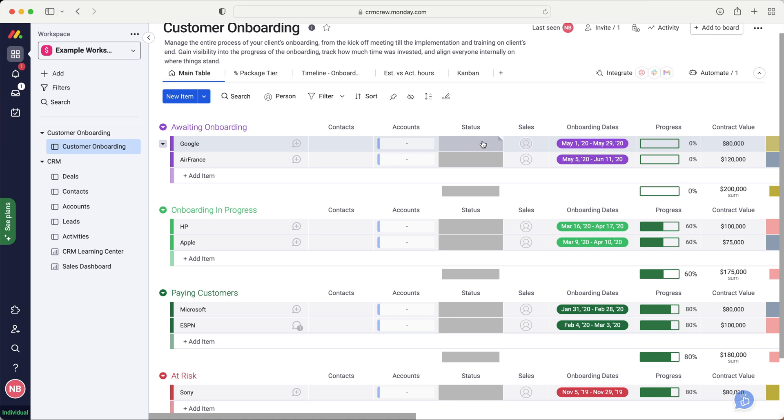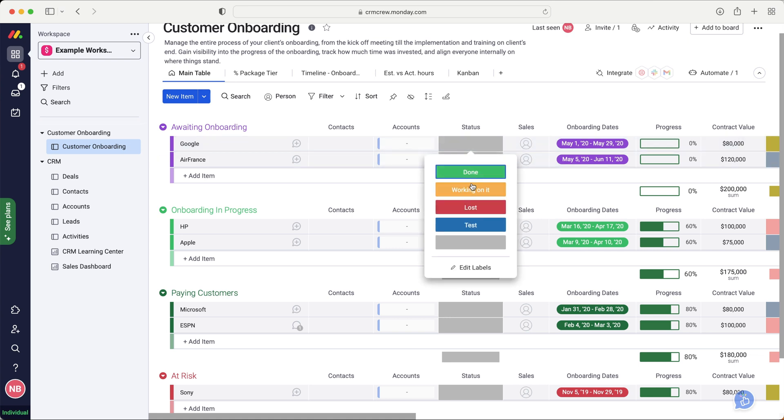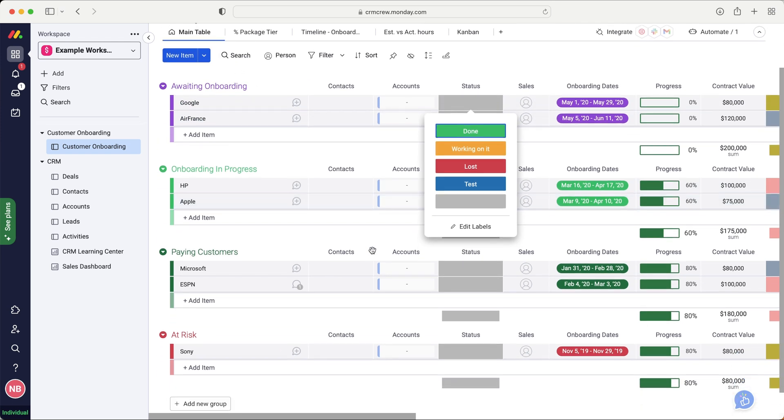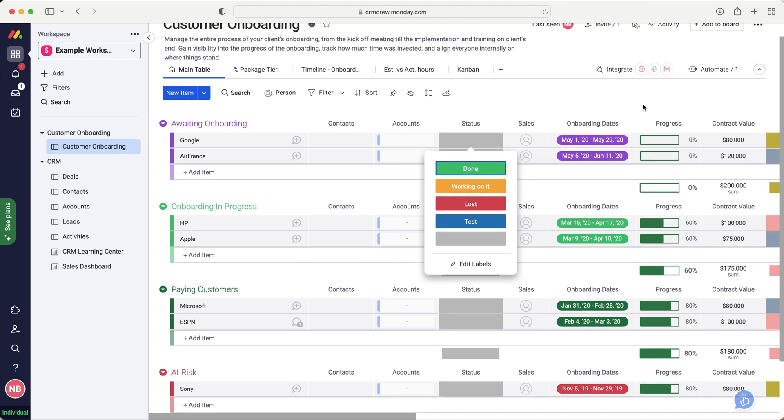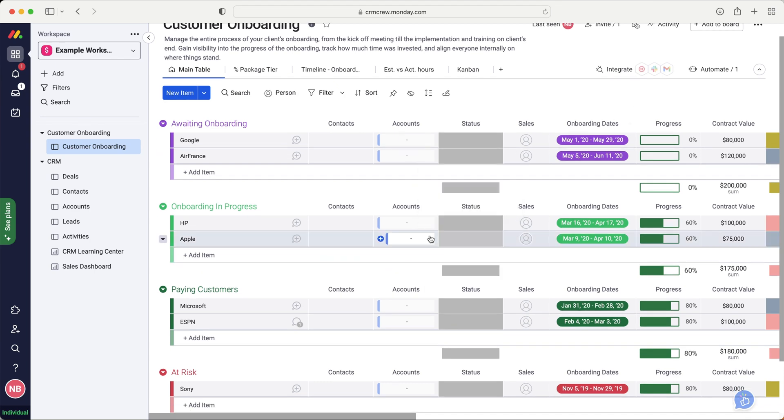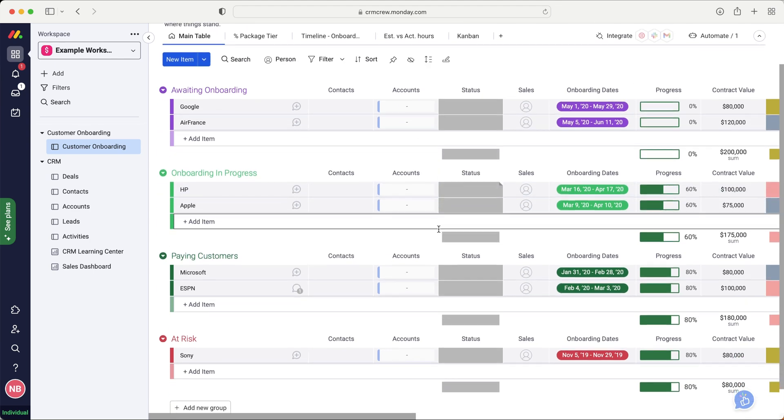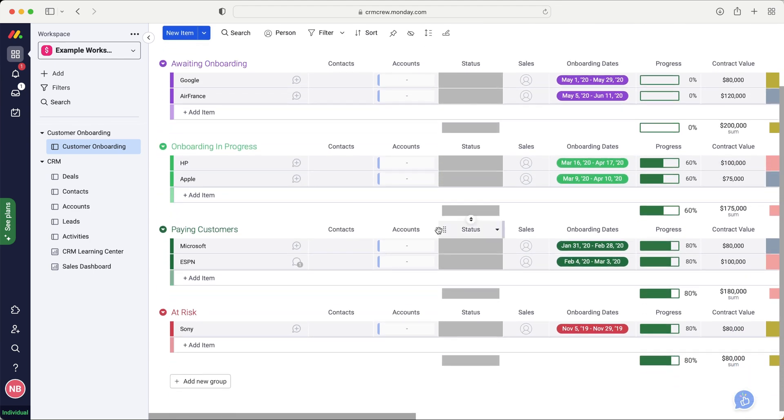So that is why I recommend creating the status and replicating the different groups. And then once you've done that, you can then automate. So if status equals working on it, move, or let's say if status equals onboarding in progress, move item to onboarding in progress group, and you can get really clever with it. And then you can just see everything moving automatically based on the status information. So you can update from the Kanban view, and it will update on the board here just to keep on top of all of your information.